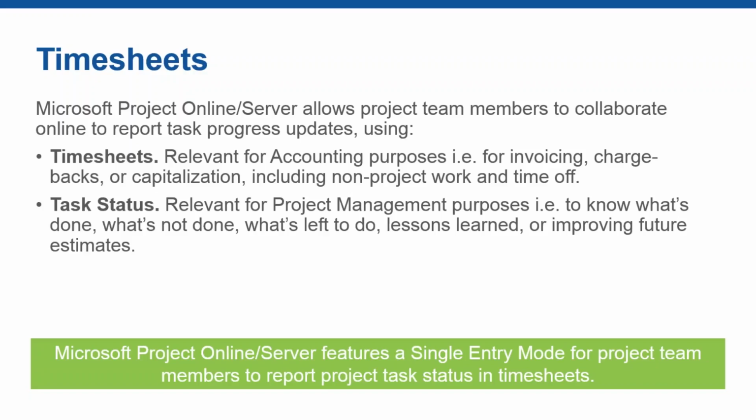And with that said, what the system also allows you to do is use both at once. You can enter task status through a timesheet and also report other time categories, let's say sick time, vacation time, or operating time, for example. That's what we call single entry mode.